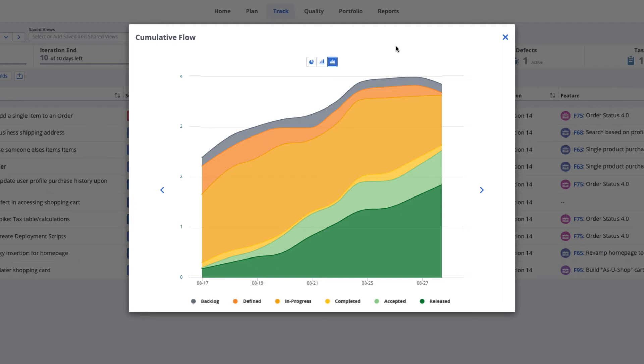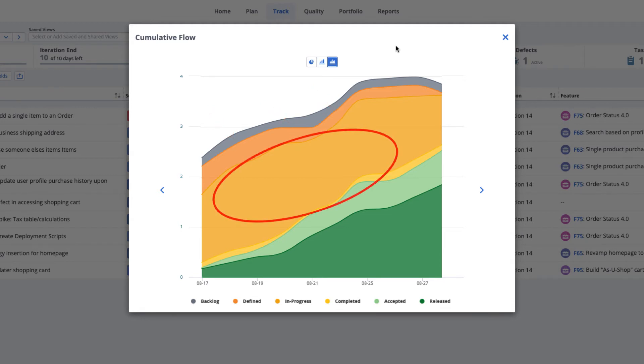Here you can see that work continued to be added and defined in the first two-thirds of the iteration. With so much work in progress, it might have been better for the team to swarm to get it completed rather than to add new work.